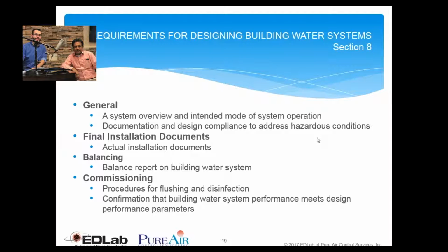And then commissioning is a big part, because the procedure shall meet the requirements of AWWA Standard 651 or AWWA Standard 652, where AWWA is the American Water Works Association. So details of these standards are mentioned there. This is again a very complicated section, but it is very beneficial. If you practice that, then you are minimizing the risks of Legionella.